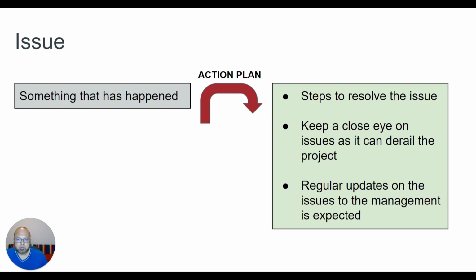You want to give regular updates to stakeholders, because every time you present your status report, if you have a status that says yellow, that means cautionary, an action plan is needed, the project may be derailing, they'll be asking, so what's the issue? And you're going to say, well, we haven't got the server delivered by the vendor as planned, so we are taking care of that.